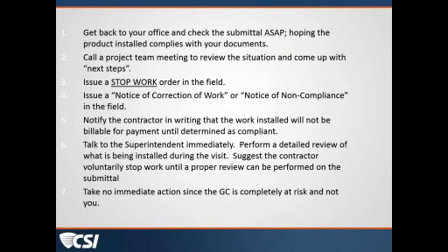Would it be smart to issue a stop work order in the field and then issue a notice of correction of work or a notice of non-compliance in the field? There's work that's been installed that hasn't been properly reviewed and accepted. Might you notify the contractor in writing that the work installed will not be billable for payment until determined as compliant?